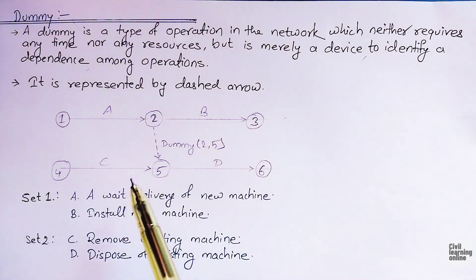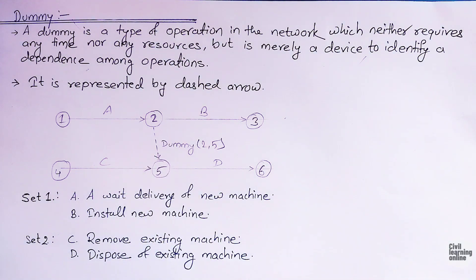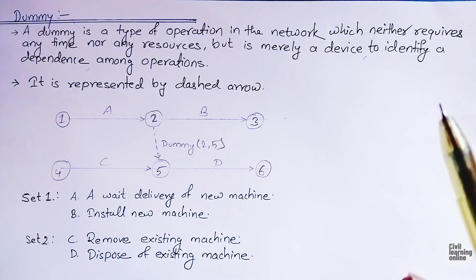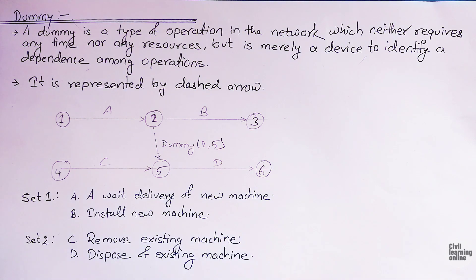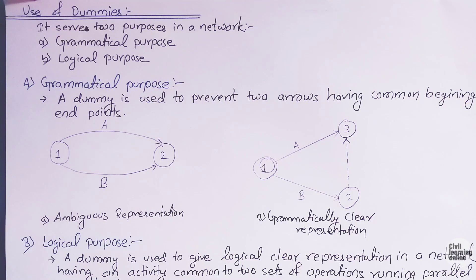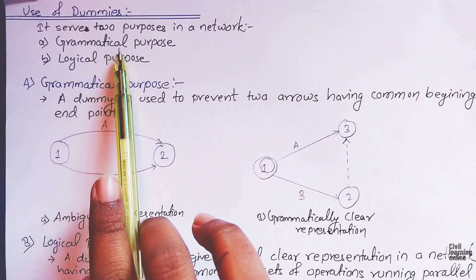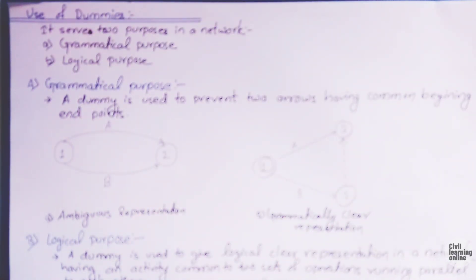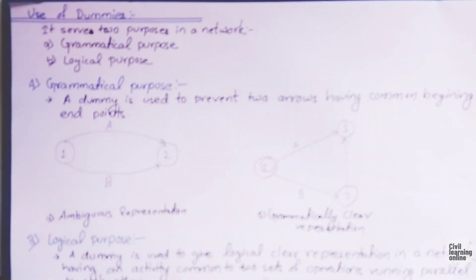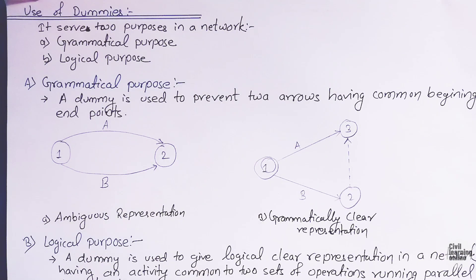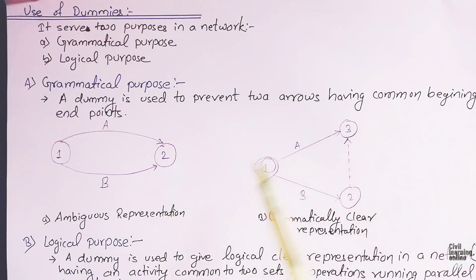Until the new machine is delivered, we cannot remove or displace the old machine. In such a case, the dummy activity comes into consideration. Now moving toward the uses of dummies: in a project network, dummy activities are provided to fulfill two purposes — grammatical purpose and logical purpose.